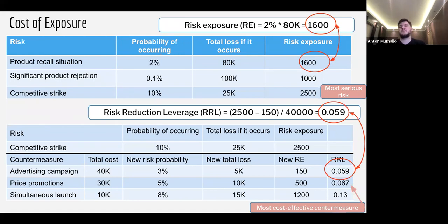I would say, 5–10%. So the accuracy, let's say, will be 10%. So we can say 10%, 20%, 30%, 40%, 50%, etc., but not like 15% or 23%, right? So we can say, well, we have so few defects related to this, and in previous releases we didn't have any defects related to this, no customer defects. So I would say the probability is below 10%.